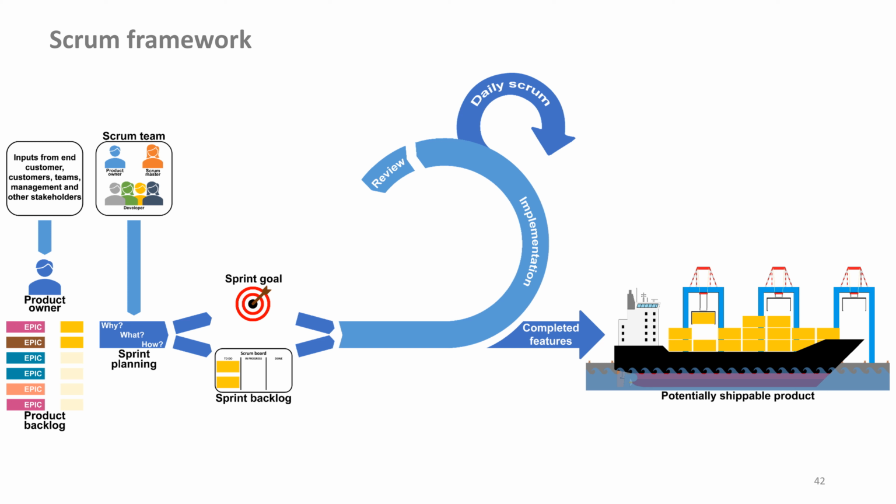Remember back to the Agile Manifesto at the point, collaborate with the customer over contracts, and respond to change over following a plan. We decide with the customer what the possible steps are in the next sprint. In practice, this means that the customer gives his/her feedback to the product owner, who then adjusts the product backlog.